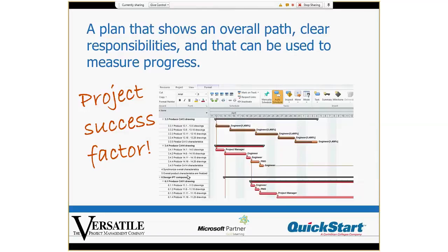Who updates the progress of each task? And Ruth sent that question. I'm happy to answer that. You know, there are a lot of ways to handle it. If you're using SharePoint, the individual who's responsible for it can just open up the SharePoint list, and if they have access, if they've been given security access to that, then they can update it with a % complete or say it's 100% complete. If you're using MS Project, typically that's only available to the project manager.